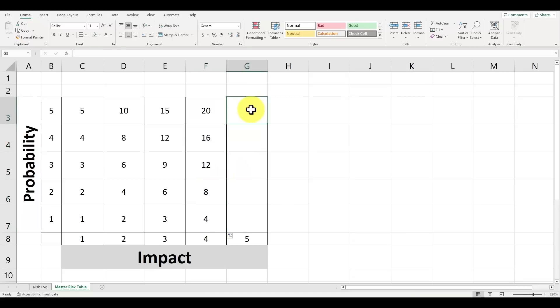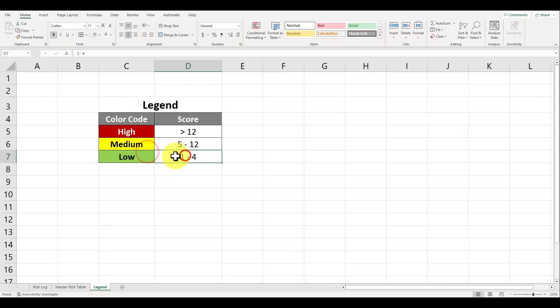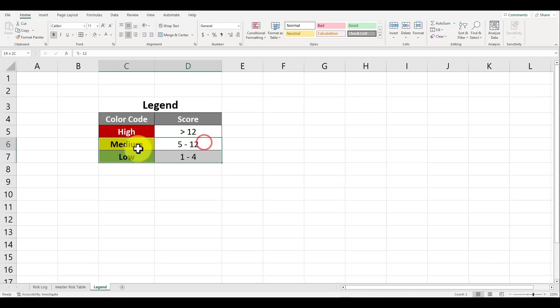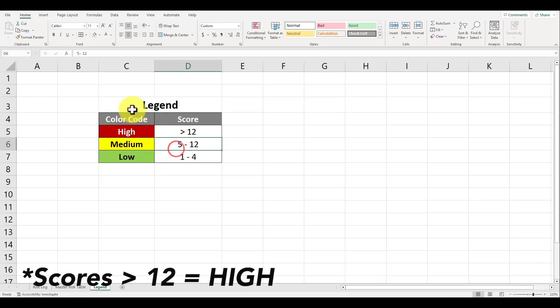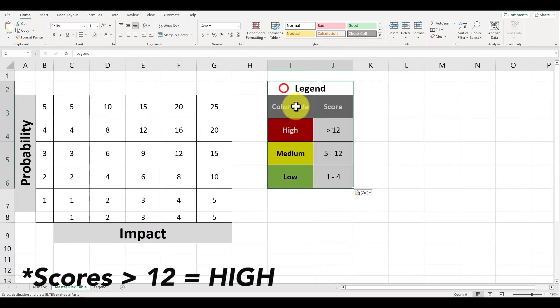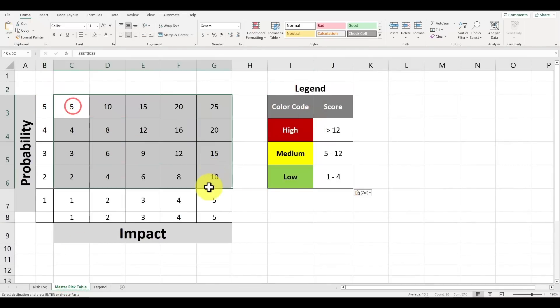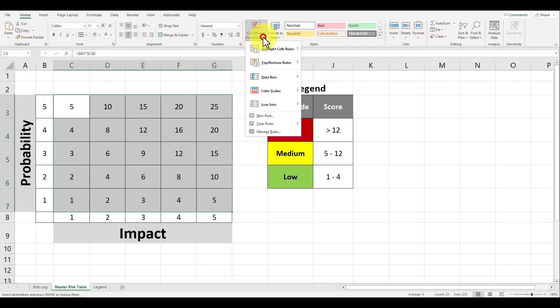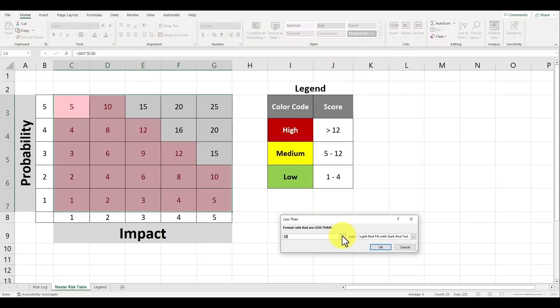It's now time to color code our matrix using the following legend. Scores between one and four should have a green color and will correspond to a lower risk. Scores between five and twelve should be yellow corresponding to a medium risk, and any score above 10 should be red which is a high risk. Now let's highlight all the cells within our 5x5 matrix. Go to the button for conditional formatting on the home tab, click on it, hover over the highlight cells rules and let's select the option for less than. Format cells that are less than 5 to be a green fill with dark green text.